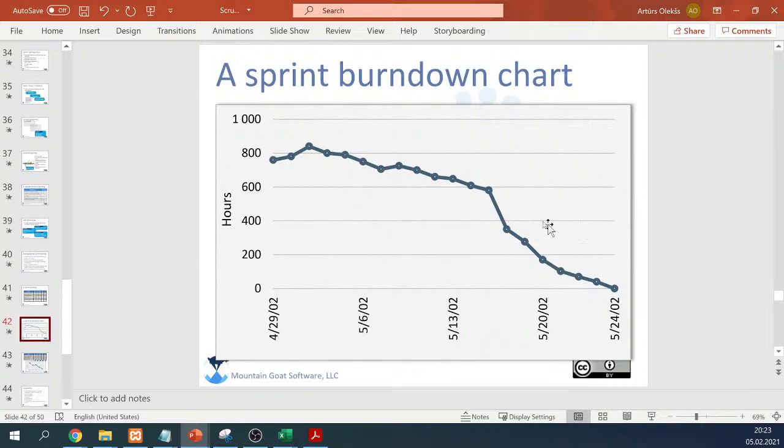So here we have, say, 3 hours in case we have any issues, we need to work on any emergent issues. So this is like insurance for our project work.